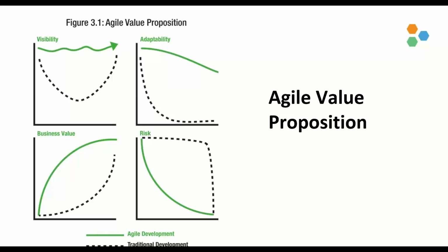And because the longer the project runs, the longer the horizon becomes for risks that can reduce value, like failure or decreasing benefits or erosion of opportunities and so on. So another major reason for focusing on early value delivery is the stakeholder. Stakeholder satisfaction is going to play a really big role in project success. So tangible results help the team raise the confidence of our stakeholders, build rapport with them, and get them on board early, creating this kind of virtuous cycle of support.